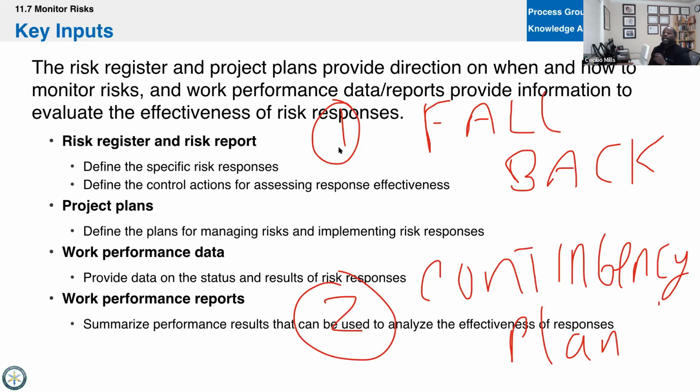But the fallback plan says this: okay, it's going to rain. Let's reserve both the clubhouse and the greens, and then we'll set up for an outdoor wedding. And we'll hire extra hands. And if it rains, then we'll take everything and go inside and have an indoor wedding. That's the fallback plan. We are changing course. We're doing something different. We're no longer sticking to the original plan.